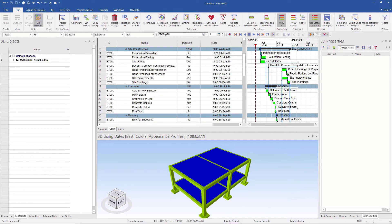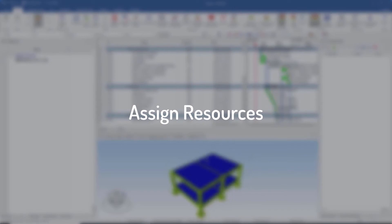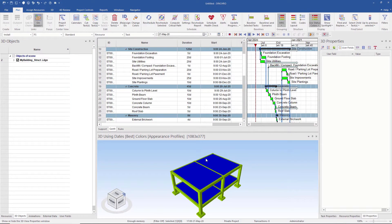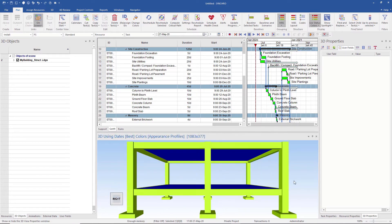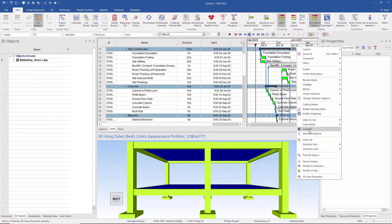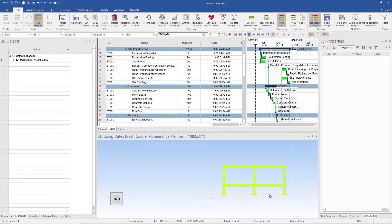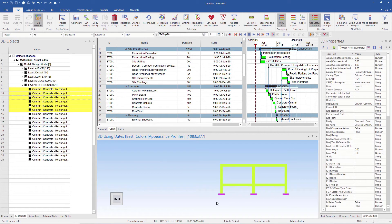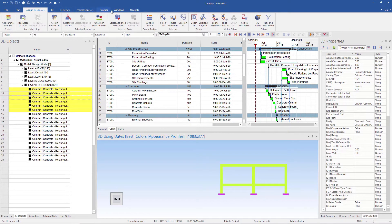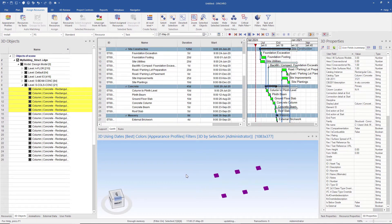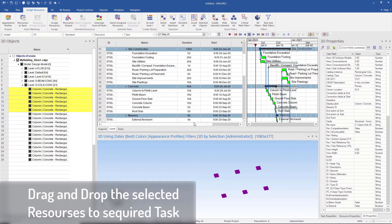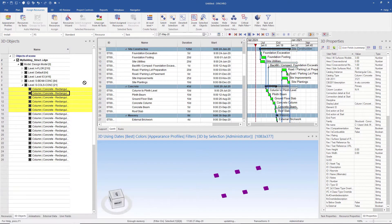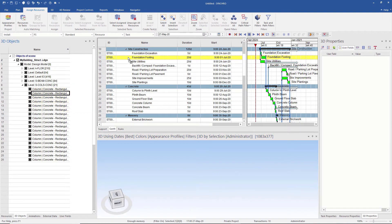We are going to assign some resources to their corresponding tasks. Each element of the model is treated as a resource here. Before assigning, we first flatten the view by right-clicking in the 3D display and selecting the isometry. Then we select the required resources by left-clicking and dragging. The selected resources are highlighted. We isolate the selected resources by going to the Assign Resource tab and then selecting Isolate Selected. The selected resources are highlighted in yellow.